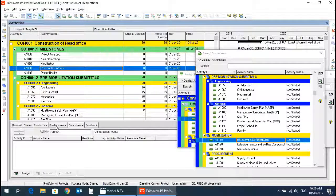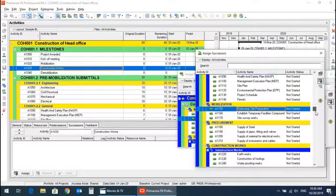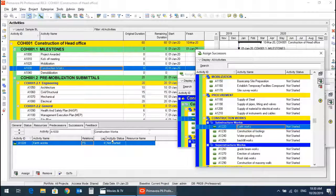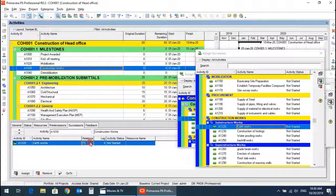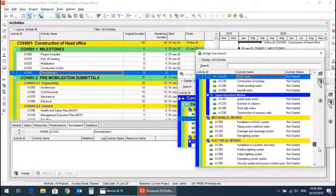If the construction works are started, the successor will be the site works and earthworks, with a start-to-start relationship.